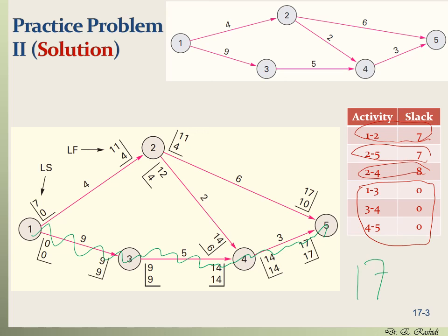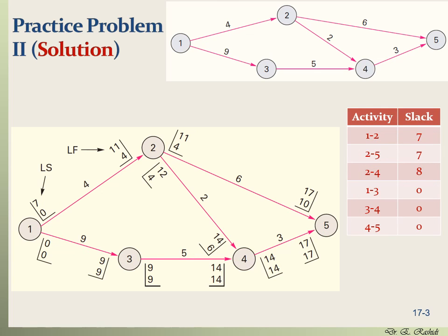These are individually. So when you want to apply this it is going to be different because you cannot delay all the activities on a path by its slack, because when you actually compute the slack, it's based on the assumption that all the activities start with no delay in the previous or the after activities.